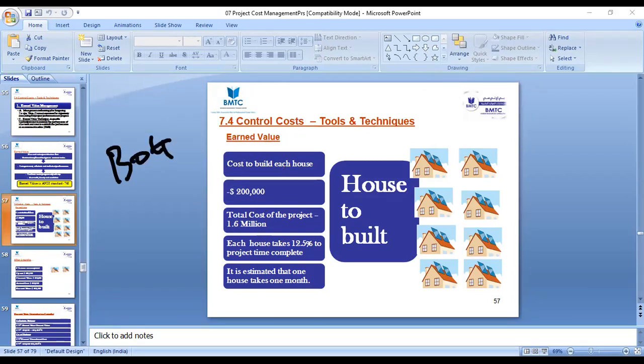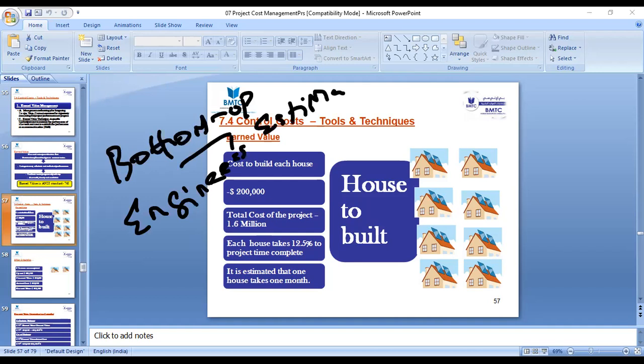And if you still want to increase the accuracy in your estimation, then you'll go with something called bottom up. So what is the other name given for bottom up? Bottom up is called a definitive estimation. It will not have any kind of flaws; you can have only minor errors in this estimation. You can give 95% confidence for you to get your approval to make this a single number.